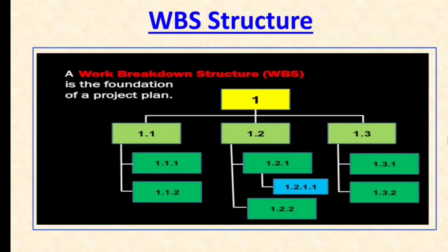Now coming back to the WBS structure, as you see, it looks like a network diagram, with the yellow one being the main deliverables, and after that the lighter green and the green ones. It is a helpful network diagram for project managers to visualize all the tasks required to complete their project. So you can visualize what's happening where. By visualizing your project in this manner, you can understand your project scope and allocate resources for all tasks. When you visualize, then you are able to manage it. Most WBS have three levels that represent the project: the main deliverables, the control accounts, and the project deliverables and work packages. All these levels will generally be there in a WBS structure.